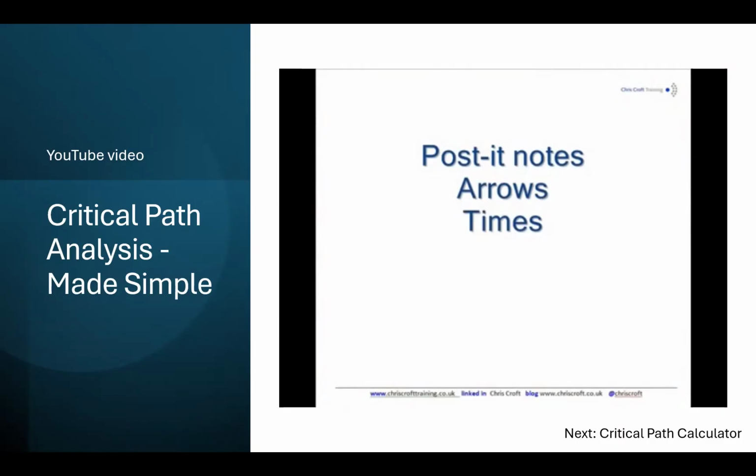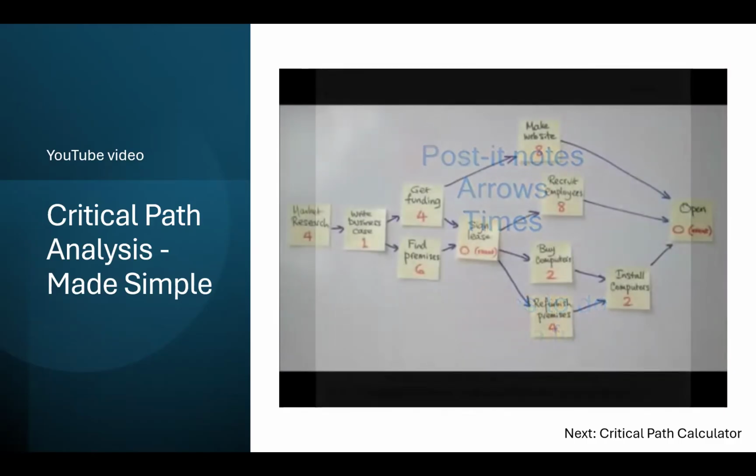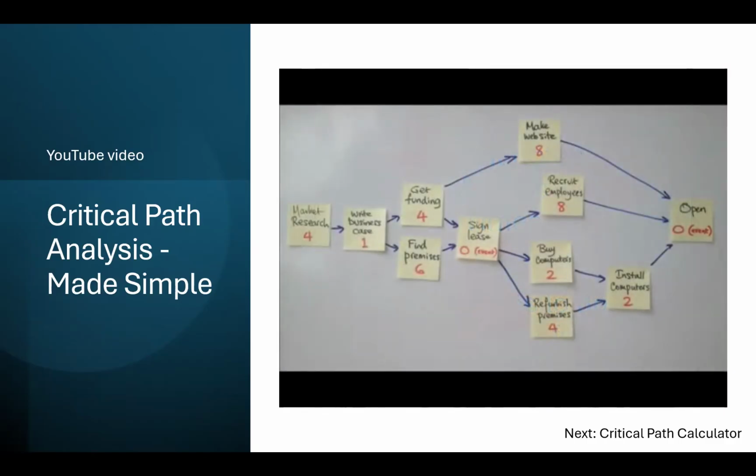So you've got a diagram drawn out with the arrows and the times. How long is that going to take you? Maybe 20 minutes, maybe quite fun to do that. And once you've got that, you don't have to do all the things that they have on those other videos. You don't have to do the forward pass and the backward pass and the float. All you do, you just look at the diagram and just look at the longest path.